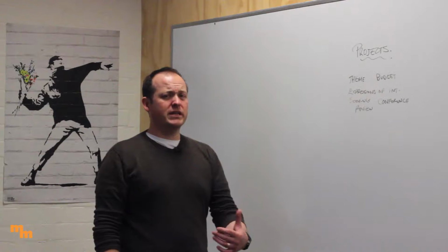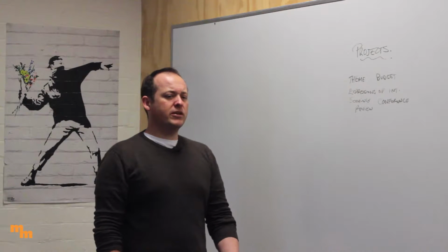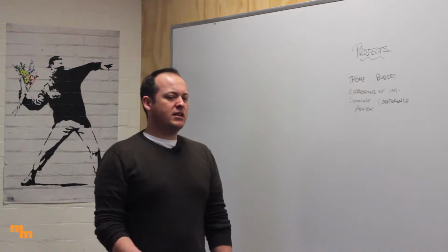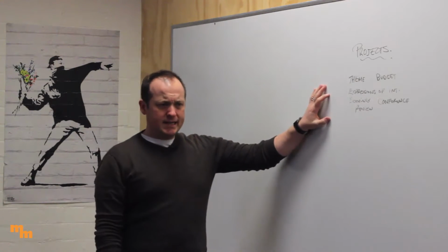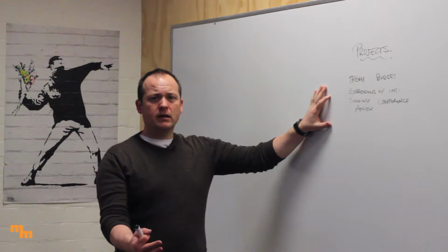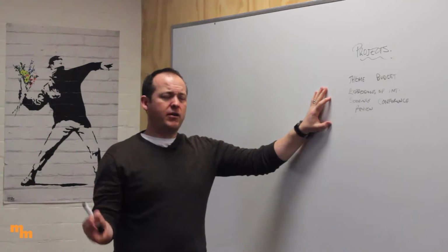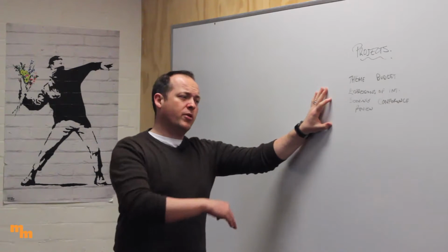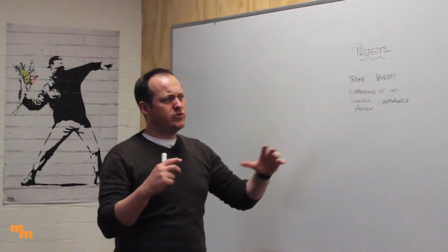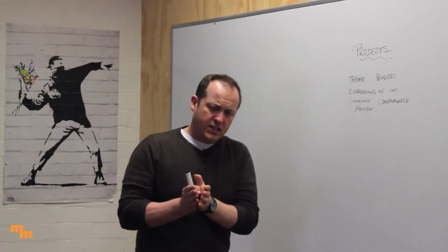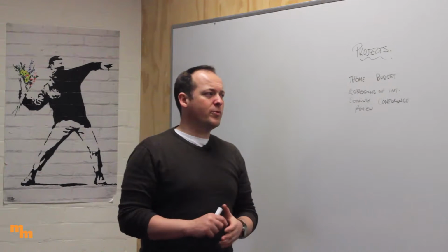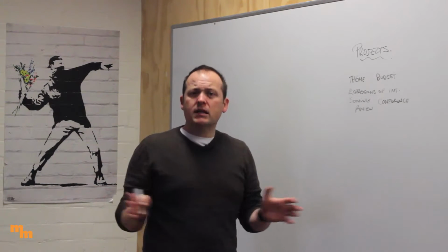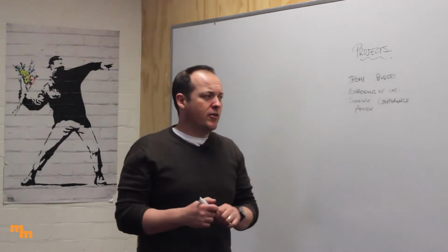Right? It's going to come down to your activity though, but really understanding what your activity is about, and then start thinking about, have I got big activities or are they smaller activities? Booking a cleaner to come by is not the big macro activity, it's a smaller activity and probably gets caught up in something else. As I say, you're trying to break them down to those broad groups and specific tasks. Okay, don't put a specific task as sort of a broad group of things to do. Collect things up into big headlines, all right?